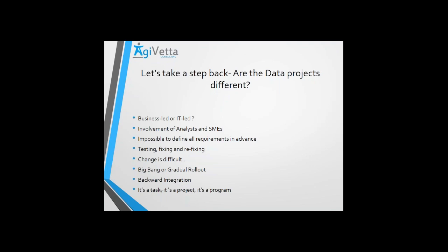But when it comes to data projects, it is almost impossible to define the requirements in advance, because users at best would have a broad level idea of what they might be looking for. But then when they see the actual reports, when they see the actual data, they might get more ideas. So your design, your data sets, your golden records have to be flexible enough for change so that you can fulfill the real user requirements. Now that leads to another problem.